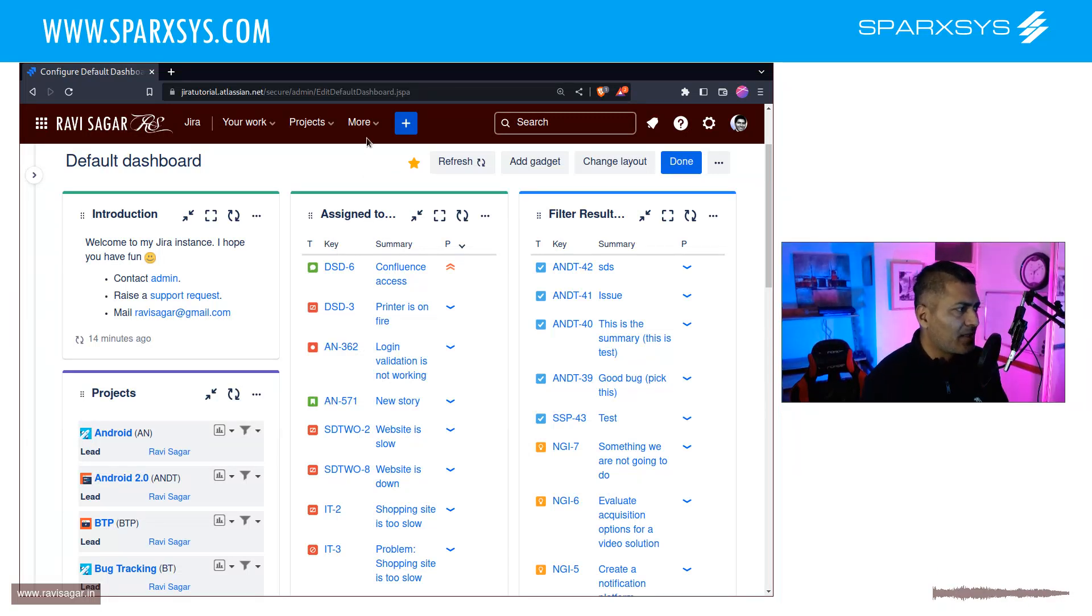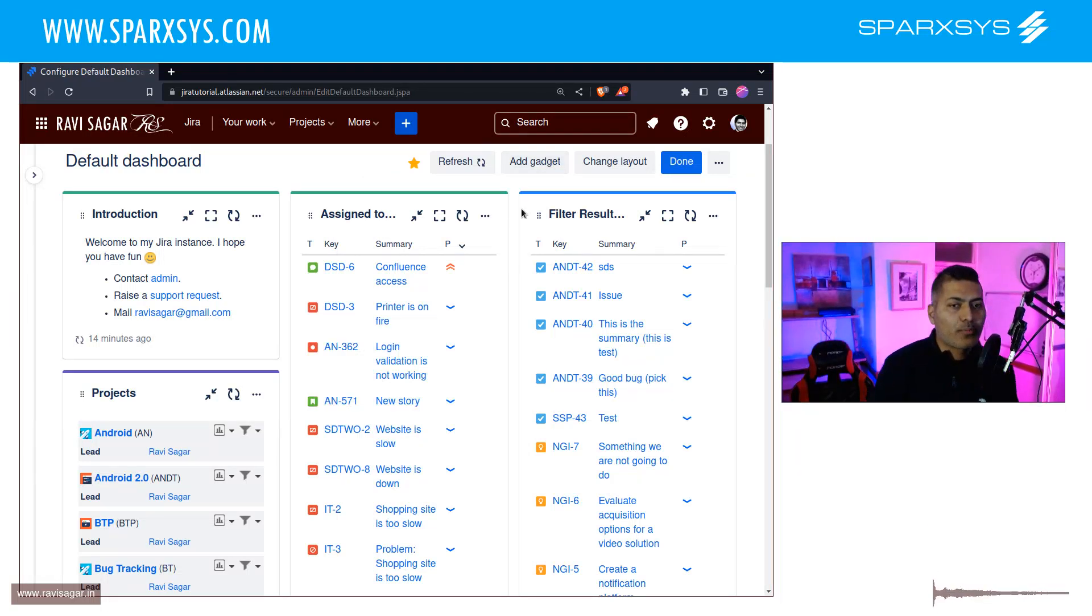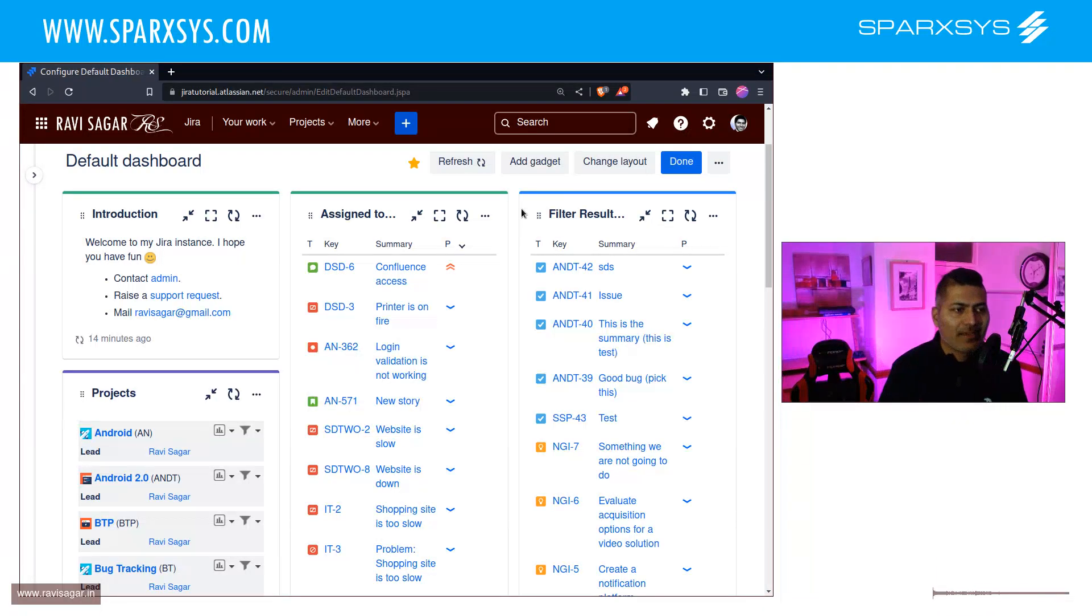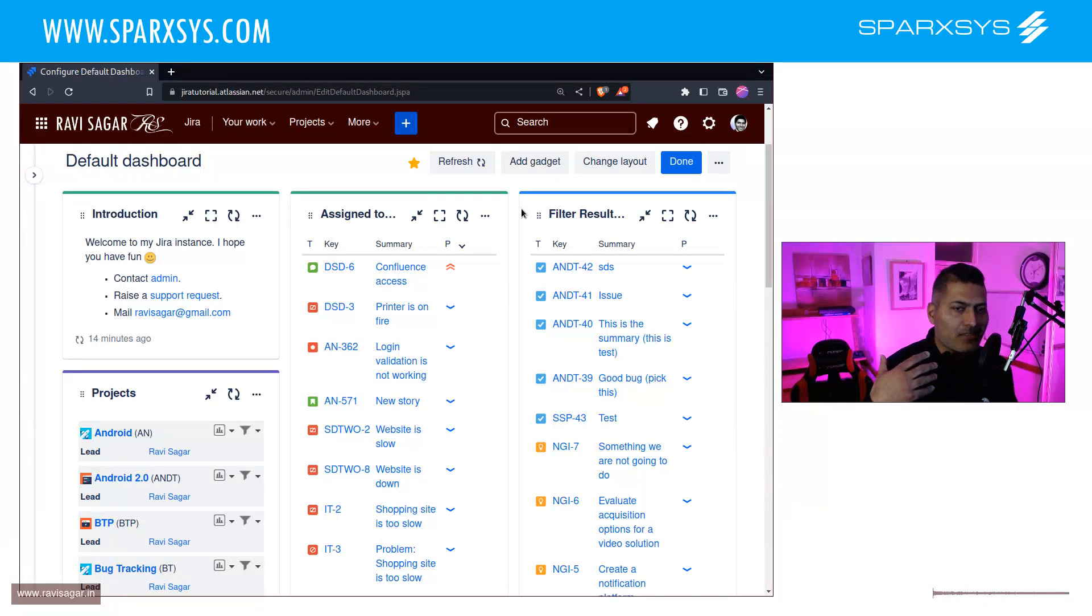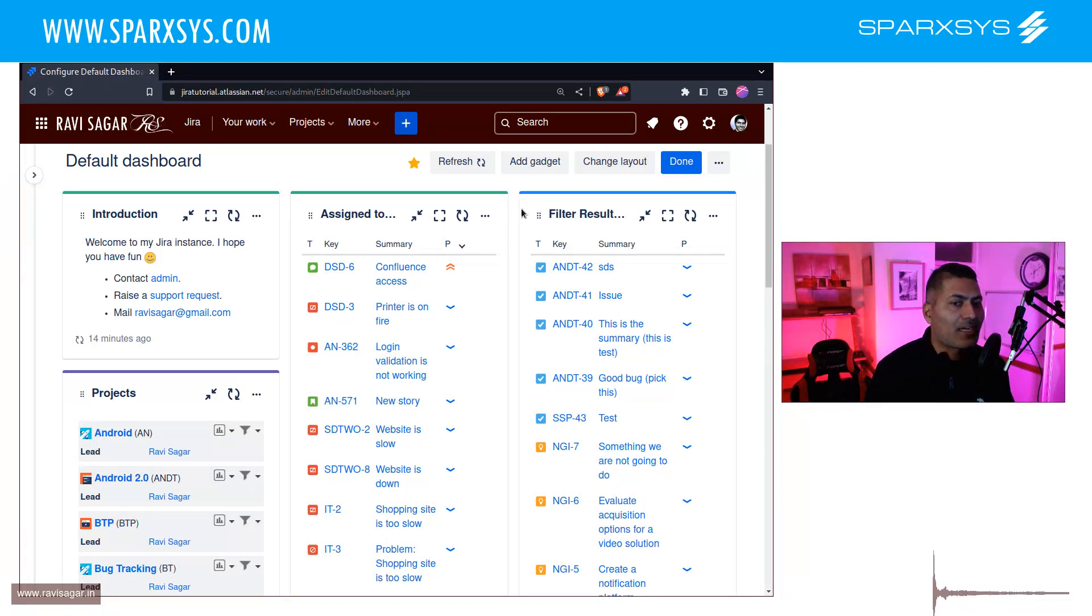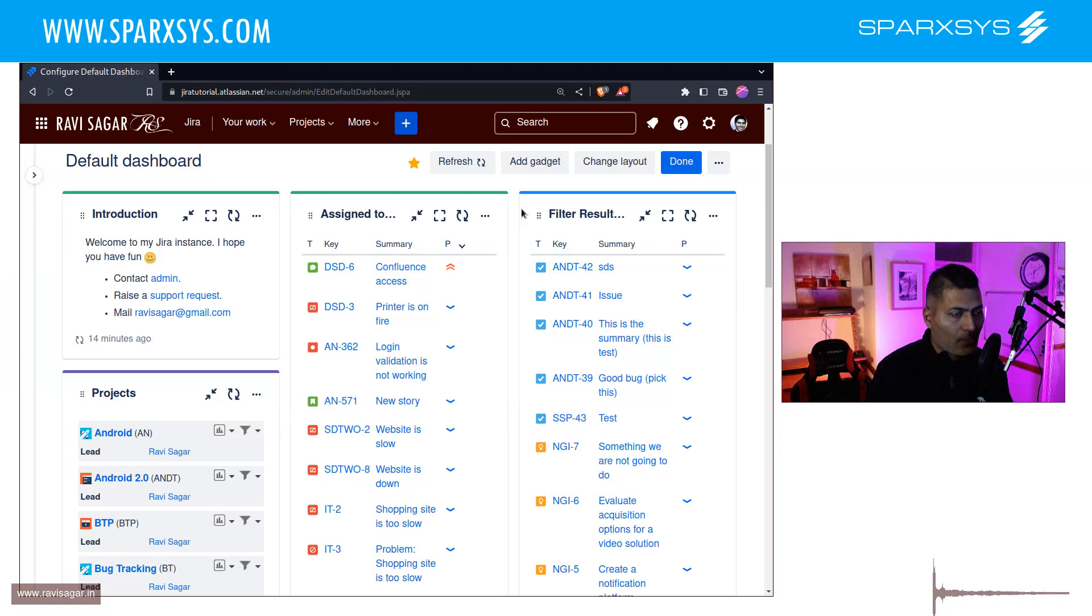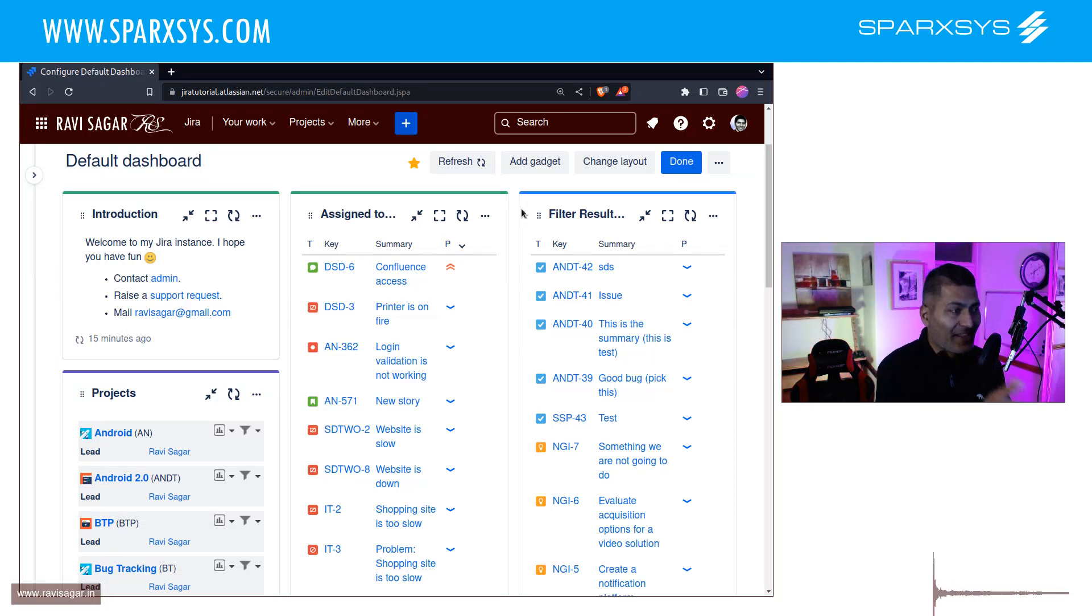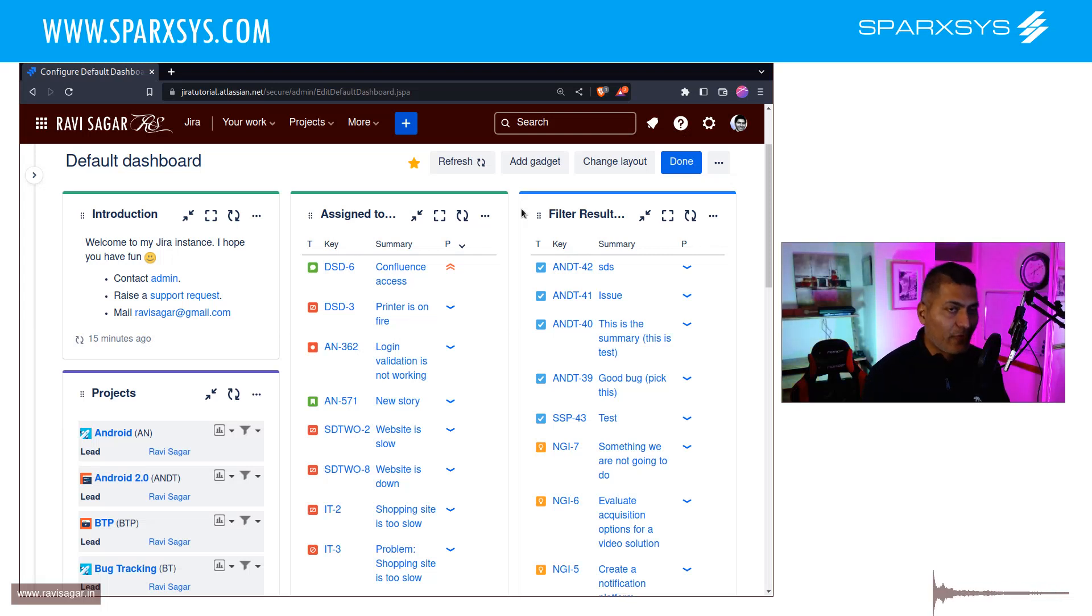And of course, for doing this, you need to first make sure that there is a filter that you create in your Jira instance. You can of course, share it with everyone so that anyone can see it. That is very important, because if the filter is not really shared, then it won't really do anything on the dashboard. So make sure you create a filter.